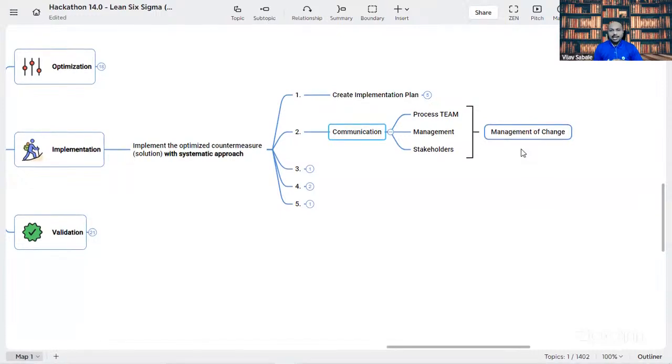Typically, the project charter is updated at the end of every phase. We just completed the analyze phase, so it's a good time to review the project charter. If any modification or update needs to be done based on whatever changes or implementation happened in the analyze phase, we need to do that. Only after that are we going to enter into the improve phase.